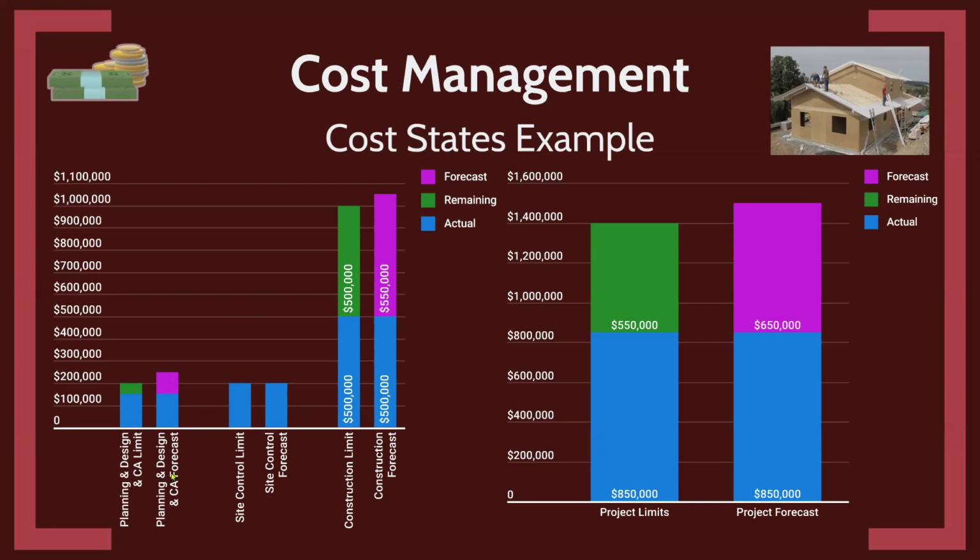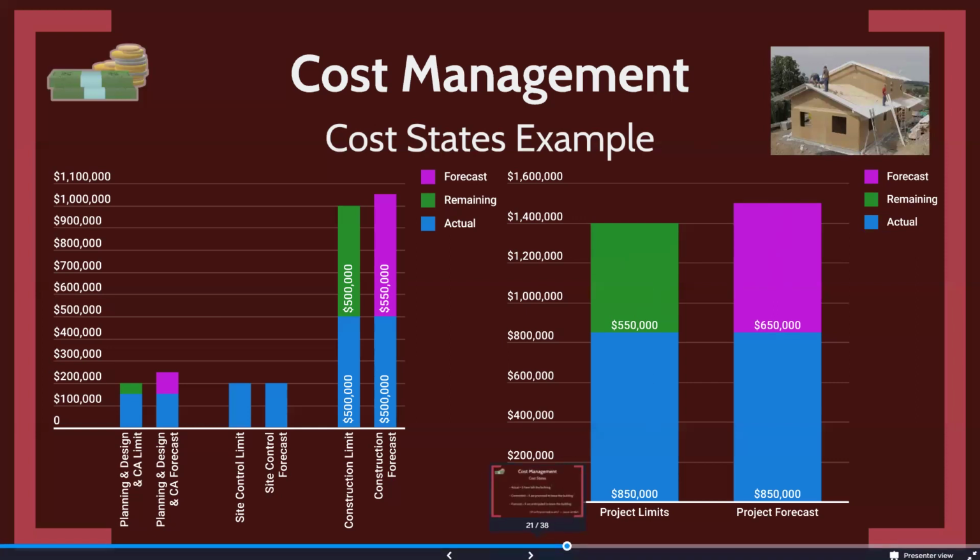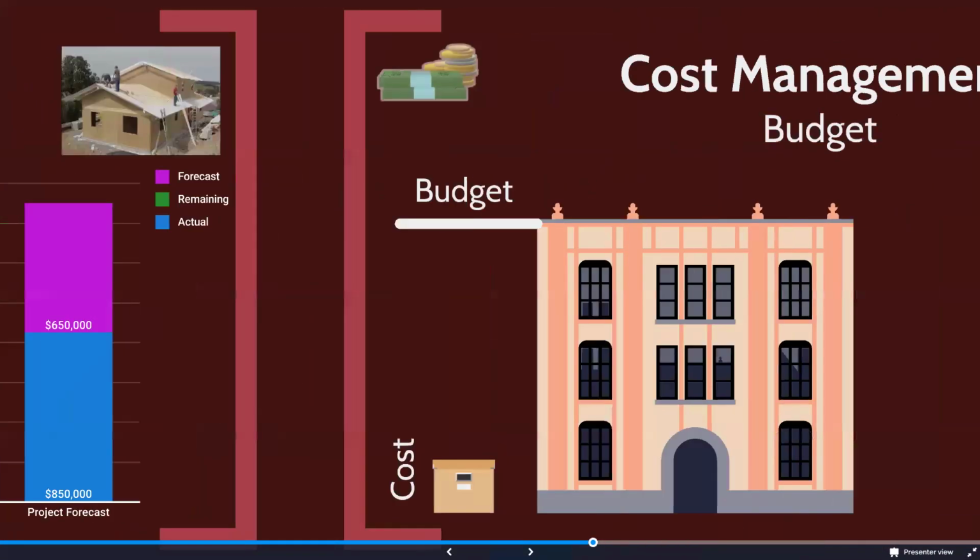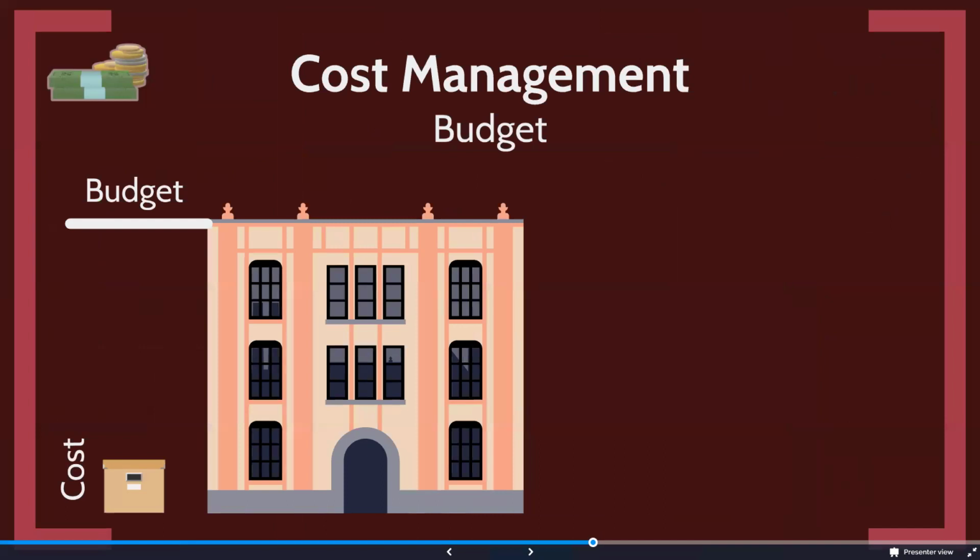And then you aggregate all these things together. So I aggregate all my different types of costs together, and that gives me my project total then. And so this model works real simple for any project system. And thinking about, again, actual, committed, or remaining, in this case, we're sort of looking at the remnant of what's committed. And then compared to your forecast. And again, that forecast gives you the ability to go above or below. So again, that's what we're talking about when we think about costs.